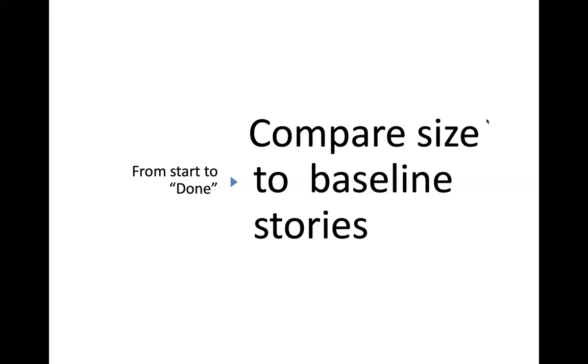Because whenever we take new baseline stories, it will be tough to provide the estimations every time, because all the user stories are different. Whenever we provide estimations, the technique is always different compared with the previous ones. So we should take one baseline user story, and that user story should last for 4 or 5 sprints. After that, the team is mature enough that they can provide better estimations even without baseline user stories.